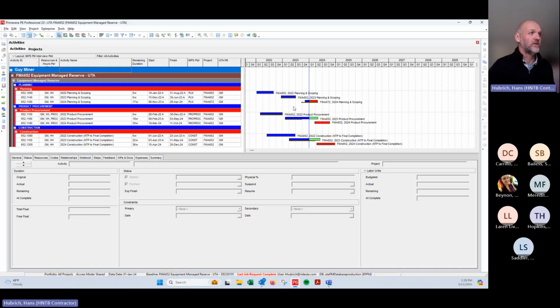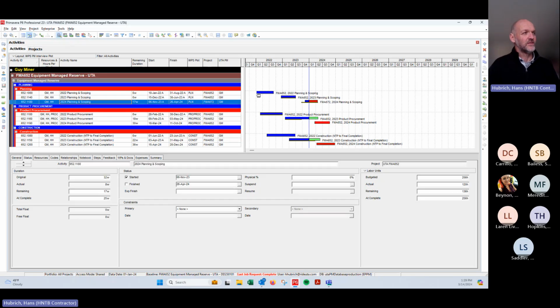On the right side in the Gantt chart layout, or the timeline layout, you'll see that the activities have a large bar and then a small yellow bar underneath them. The small yellow bar is showing your baseline schedule. So when we're talking about assigning baselines or maintaining baselines, that is going to affect these little yellow bars that are displaying. What they're meant to show is, last time I did a schedule update, what was this activity's duration and where does it stand now?